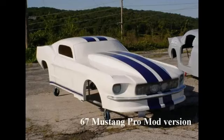Budget setting process. Market research. LJRC conducts in-depth market research, analyzing competitor car specifications, pricing, and recent performance data. They establish a target sales price of $220,000 for their car, considering the potential performance edge. They then estimate the maximum budget they can allocate for parts and assembly to achieve a 20% ROI. Increased target ROI reflects the potential higher selling price.